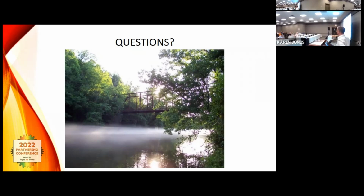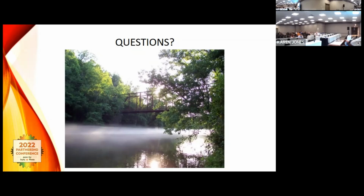And, you know, when we worked on the Russell Fork bridges, we had the crawdaddy to deal with. Mhm. And we were the first on that one, but we didn't know if they would use a low water cross. We had a permit. Yeah. And that way it was available if the contractor needed. So get your construction guys involved and they bring some insight on how you're going to build it. You might need this extra stream crossing or an extra little bit of impact. That way you can try to negate some of those potential changes you may have down the line.